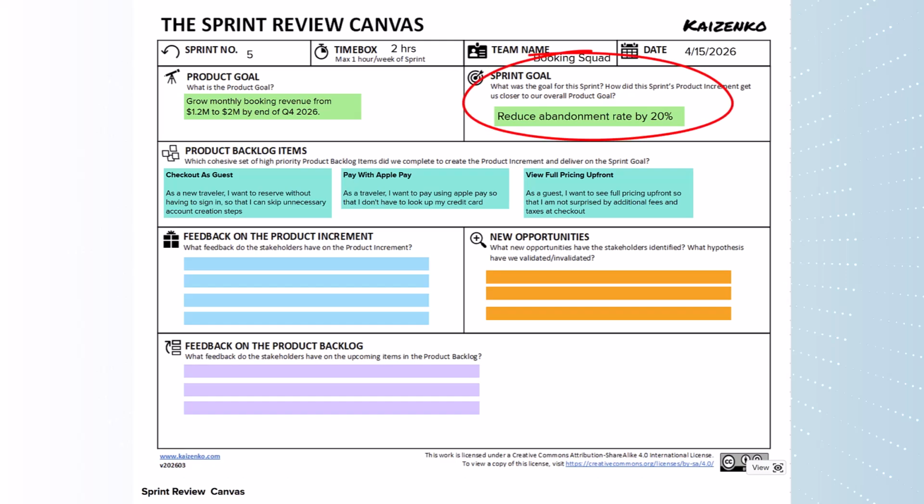Now, will we be able to determine if we have met our sprint goal? The answer here is no, as sometimes we need time to get additional usage data to see if we had an impact on a metric or not. We will likely not get that for another 2 months or so in this particular case. At that time, we can revisit the sprint goal and see if we need to work on it some more or whether we've accomplished it.